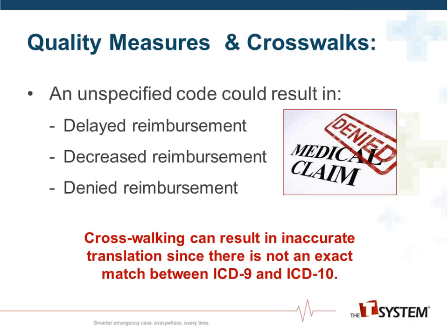A community hospital can work with all vendors and its payers to perform end-to-end testing prior to October 1st, 2014 to be prepared for the diagnosis coding detail required by a payer. End-to-end testing consists of charge capture, transmission of the code to the billing system, any processing through a claims scrubber, and transmission of the 5010 transaction to the payer with a return 5010 transaction from the payer with adjudication of the claim.